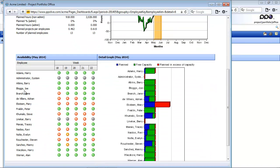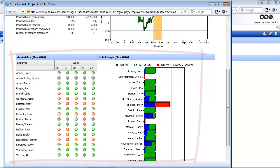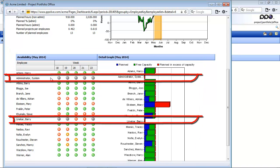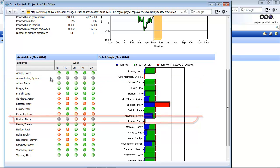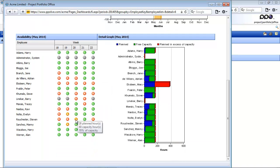At the bottom, you will see all the employees that form part of your resource planning and what their capacity is. Employees with a grey indicator are not part of your resource capacity and cannot be planned on tasks. People who are over-allocated are shown in red. Green means there is still capacity available. Amber means you are nearing the available capacity.